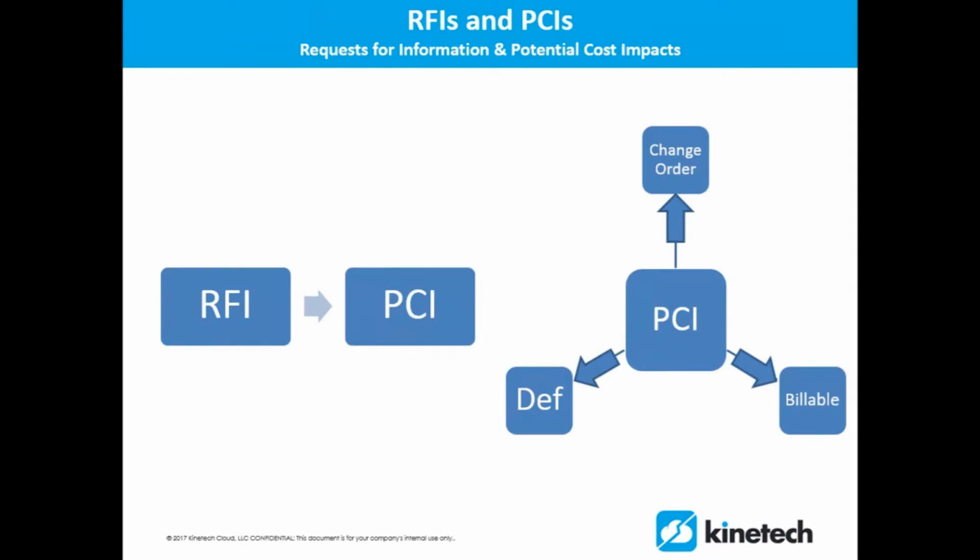So if you're asking whether a door is locking or non-locking because it wasn't specified in the plans, it may have cost impact if the door turns out to be locking and there's going to be a cost for that piece of hardware that you're going to have to add, or maybe there's more labor time, or whatever the case may be. It's possible that there may be a labor or time or material impact that you want to capture.